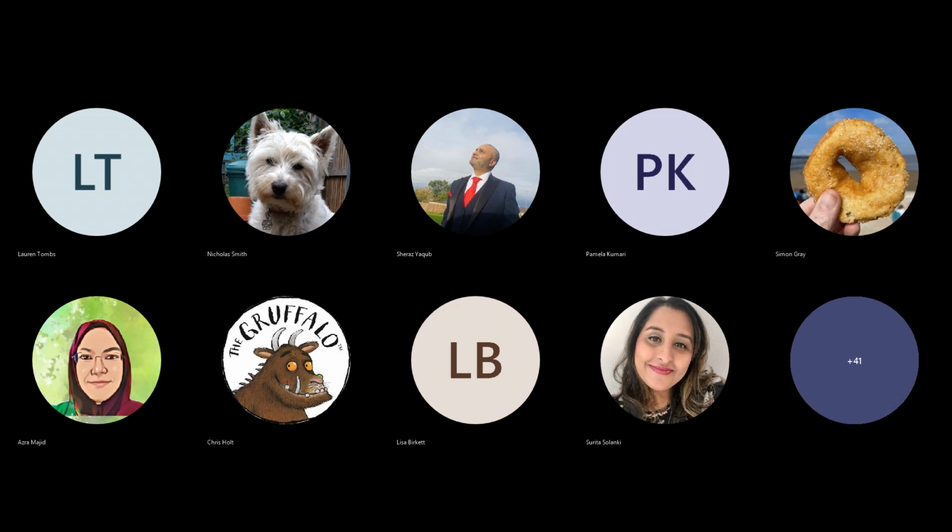Discoveries usually run anything from 6 weeks to 12 weeks. You can do shorter discoveries if you think that's more relevant. And alphas are usually anything between 8 and 16 weeks. For your alpha team, it's figuring out the time that you're going to need based on how much you've got to do, and the type of roles that you need. So you're probably going to be including a few more technical people, a few more designy people, content, because we're going to be prototyping and testing with users.